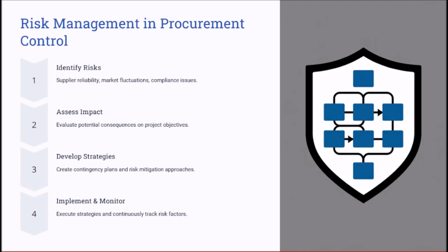Also, one of the important risk mitigation strategies is choosing the right type of contract, and we talked about understanding the types of contracts. You recall when we talked about the fixed price contract, it reduces the financial uncertainty and puts all of the risk on the vendor or the supplier side. Also, one of these mitigation strategies to